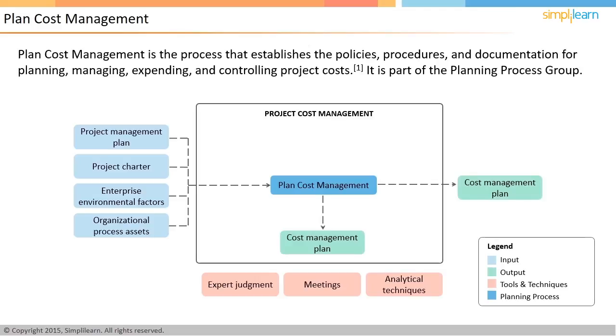It establishes the units of measure, levels of precision, organizational process links, control accounts to be used, rules for performance measurement and reporting, frequency and methodology of monitoring the costs, and various other details that lay the overall framework for cost management on a project.